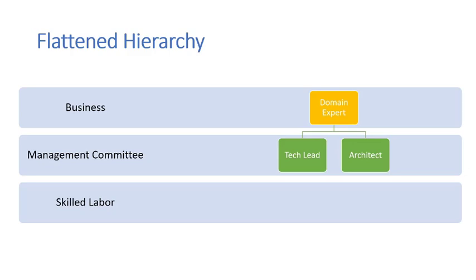Okay, it should be up to the tech leads and the architects determining this, and it shouldn't be just individuals making those decisions. It should be done by committee to come up with a consensus of what is the most important thing that needs to be worked on next. And that's how you do what would typically be managed as a backlog prioritization from a product owner.